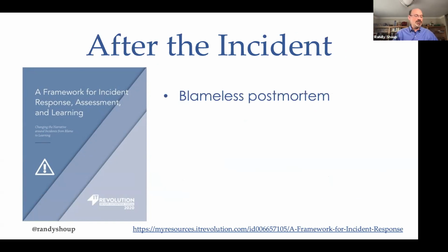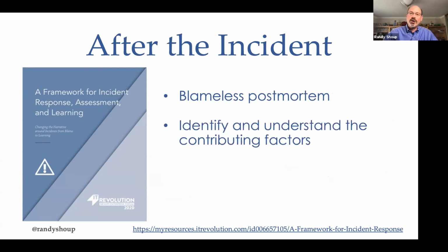After the incident, you want to have a blameless postmortem. I want to triple underline the blameless, and I'm going to talk about that in a moment. You want to identify and understand not the root cause, but all the contributing factors that made this incident happen, or made it difficult to diagnose or detect or to remediate or to mitigate. There's never one answer.